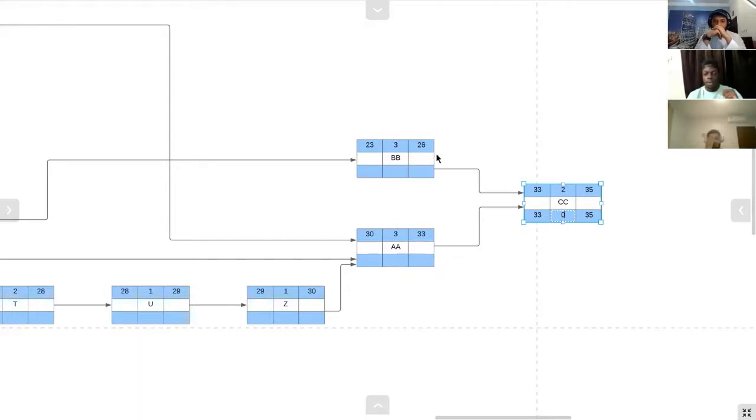After that, here we're going to take the smallest number, which is 33, okay? And its latest start date will be 30 because we are going to do a mathematical calculation. So 33 minus 3 equals 30. Okay, here 33 minus the duration will also equal 30. The float here is the difference between these. Okay, the difference is equal to 3.